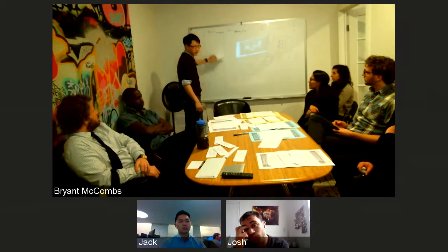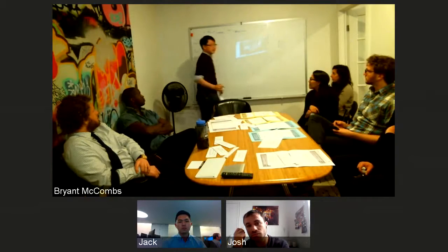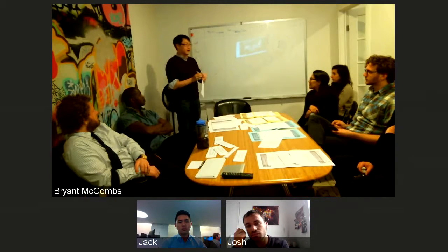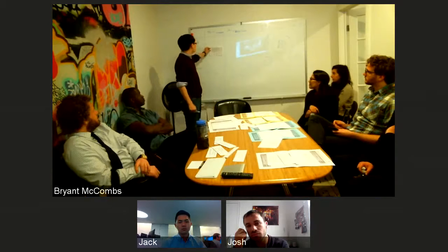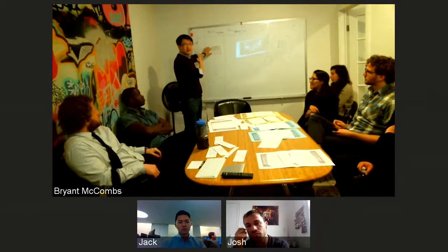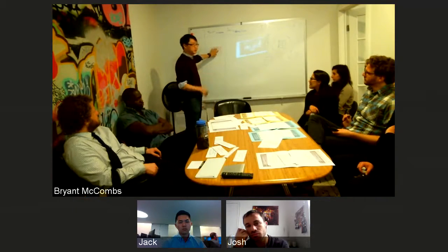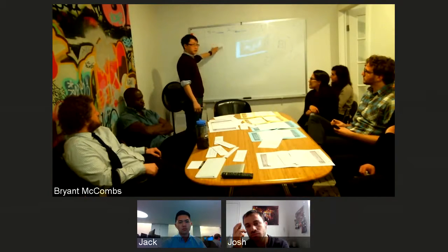And the other thing on the board is a string that moved down the board as the days progressed. You could see from across the room how the team was doing at any given moment, because you would expect things above the string to be green and finished, and things below the string to be in progress, not finished, or not even started.